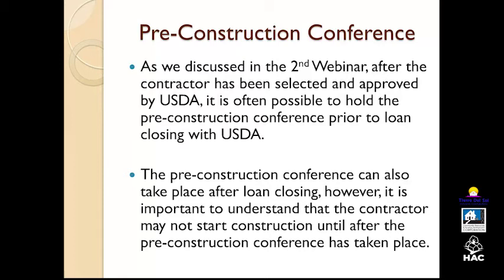So I just wanted to cover the pre-construction conference again. This is something that can occur before closing or after closing. We recommend that it occurs before closing so that any questions can be addressed at the pre-construction conference. So what's covered at the pre-construction conference? Rural Development and the contractor and you as the project sponsor are going to review the payment process, inspection requirements, any Davis-Bacon wage rate requirements, the process to handle change orders, how to use contingency funds.